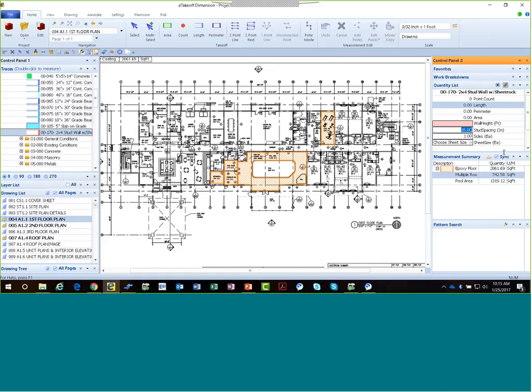That was the default that I put in there, but I can change it. I'll change it to 24, and we'll do both sides. We also have pull-down list capability. So I can say let's go ahead and order 4x12 sheets. And what it will do is produce, and then let's figure the track size, we're going to do a 3-inch wall. It'll produce all of those quantities by just taking off the length of wall.